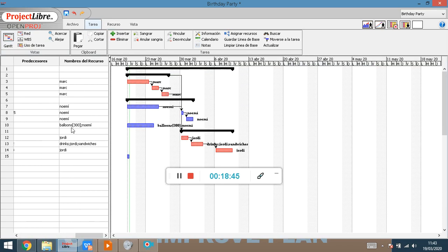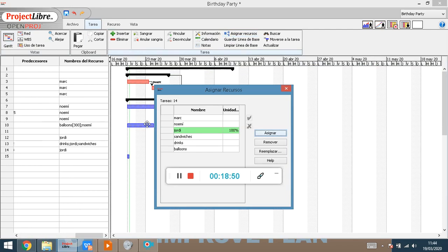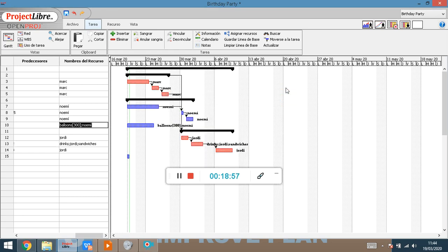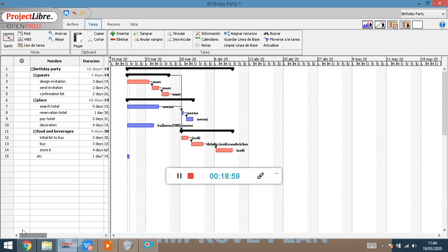If they are material ones, you know that we have to use this particular option in here called assign resources, where we can easily change the number of units of any kind of resource that we're using. And once we have this, we just have to add the duration. Here we go, in this column. And finally, we get, of course, the plan, the chronogram, which is something that we can already use and start to execute if we want to, right? So this was all of it. This is the process that we have to follow every time that we want to plan any kind of project.